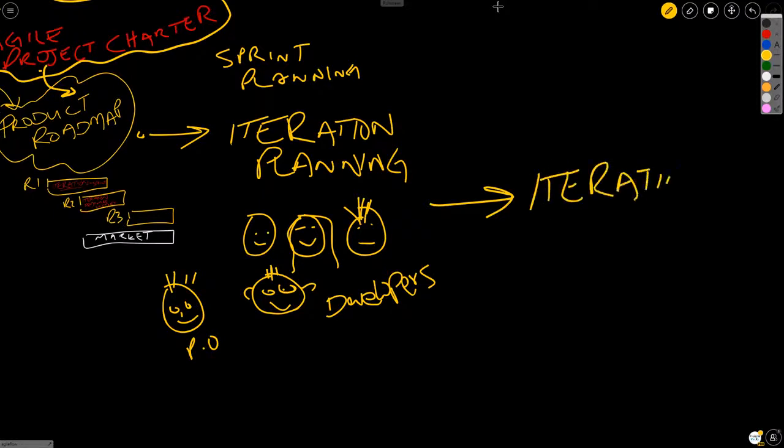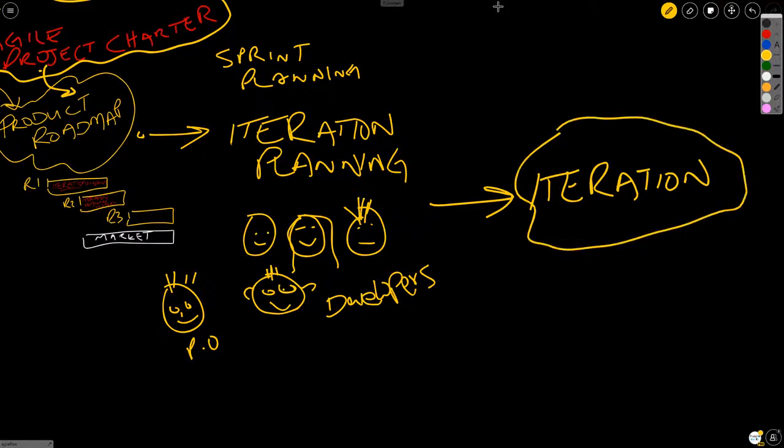And this is where the team is doing the work. Remember that to get into the iteration, your stories every sprint have to meet the INVEST acronym, the definition of ready, right? So they have to be ready to work on. And what does INVEST mean? Independent, negotiable, valuable, estimable, small enough to fit within a sprint, and testable.